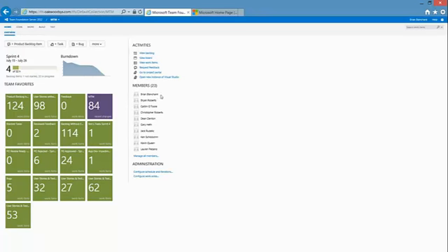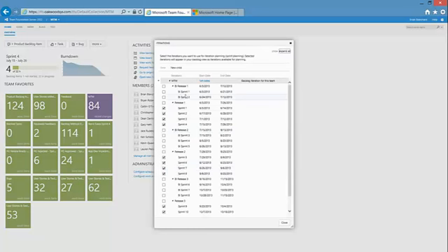So from the Agile planning standpoint, I would describe my backlog. Everything would go into that backlog, and then we would define our releases. So we would define releases by going to Configure, Schedule, and Iterations. And here you see a lot of interesting things underneath of our project, broken out by different BI releases and our app dev releases, which are not prefixed with anything. So we started this team project as principally an app dev effort. Then we added a 16-man BI team to it, and at that point we ended up breaking it out into teams, and we defined separate releases and separate sprints for them. So within one team project, we can have a separate set of sprints for different sub-teams going.